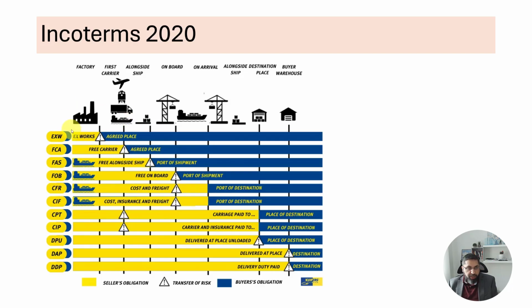So let's say you are in the United States and you're picking a supplier in Asia. You might pick that point to be a port in the US, like the Savannah, Georgia port, and you might add the transportation expense to every supplier you evaluate to bring their goods to Savannah, and then compare their price at that point. But again, this may not work very well because some sellers might have a shorter journey to the East Coast, Savannah, Georgia. Other suppliers may have a shorter or cheaper journey to the Los Angeles port on the West Coast. And you may have to go further.